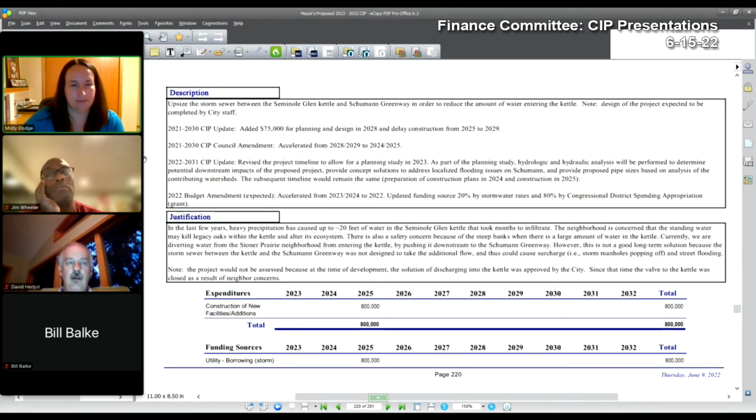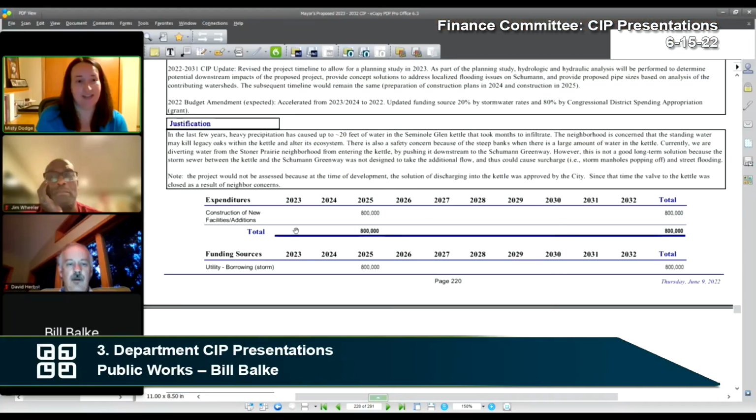You mean it'll start in 2022 with permission? The funding is going to be borrowing, it's not going to be appropriation. The appropriation was just for the initial design piece. So that would be the 2022 cost. Once a specific fix has been identified, there is not an appropriation for that construction cost yet, or expected. So that's why the actual construction would have to be paid for by the utility. And that is too large of a project for the utility to absorb with cash.